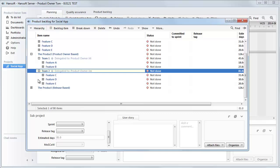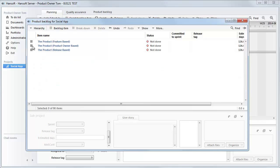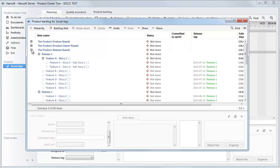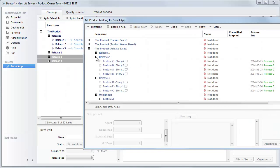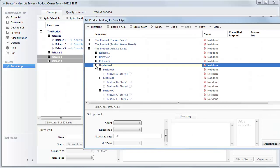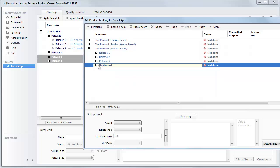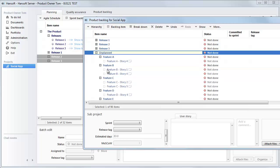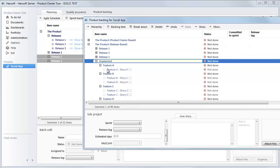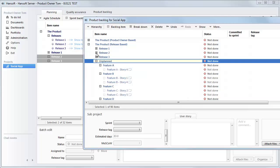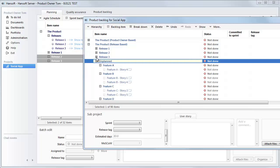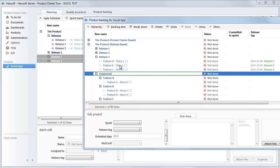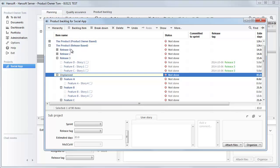And the third variant here is actually a replica of what I did in the project schedule. It's the release-based. So in this case, we have one bucket called unplanned, where all of the features that we intend to do in the future exist. And then as we plan our releases, we move items over to the release buckets. So in this case, we have release one. Here are the things we're planning for release two. And release three. And these are three examples of how you can structure the product backlog.